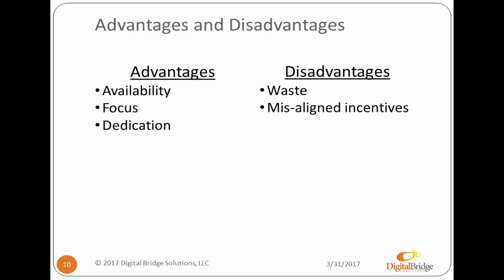Misaligned incentives. So if you are the consulting company and the client introduces a delay to the project that stretches out your timeline because they can't get you an answer on something, do you really care in this model? I mean, yes, it's kind of a bummer, but you're still there getting paid. So from the agency standpoint, you don't mind if the client doesn't turn around and answer for you. The client wants to get that product over as quickly as possible so they can decrease their amount spent. So to some extent, there's misaligned incentives in that model.